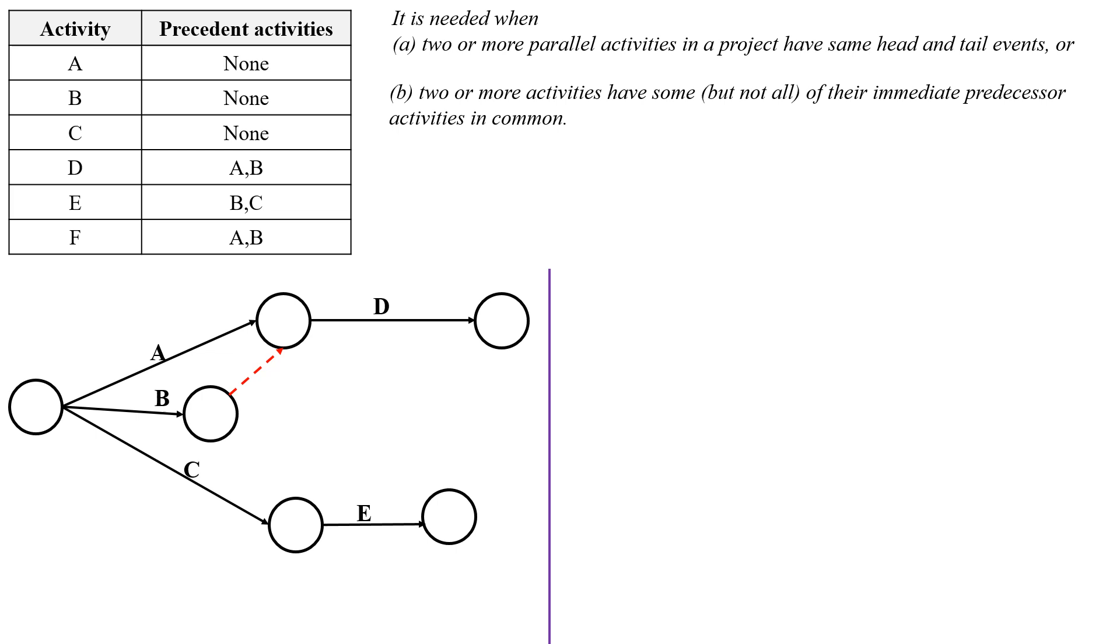So here once again I have to introduce one more dummy activity like this. Now, activity E will start after completion of activities B and C.